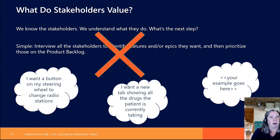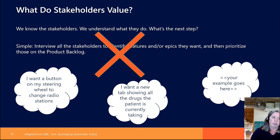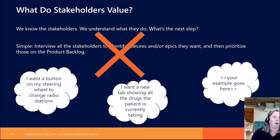We need to back people away from what they're asking for — or better said, we need to be deeply curious. I really want to understand why people want this. What are they trying to accomplish? Five whys is a great technique: ask why up to five times. Maybe somebody says it's not really about a button on the steering wheel — what it really is, is being able to access a wide variety of music while driving without being distracted. So I want to listen to new music within 20 seconds without taking my eyes off the road. Now I could solve that with a button, or I could solve it in other ways.